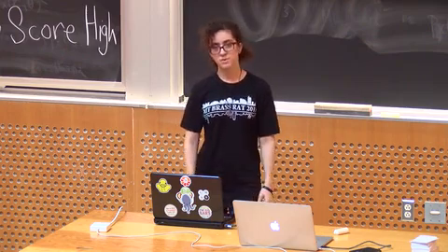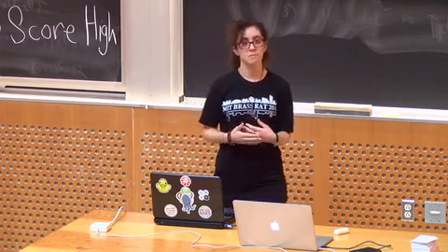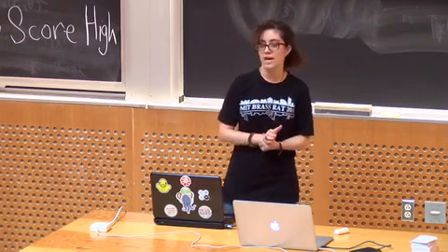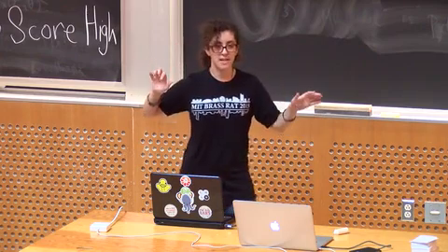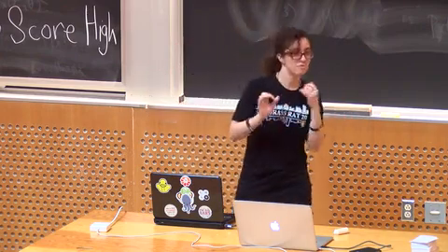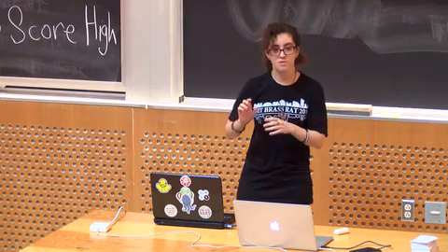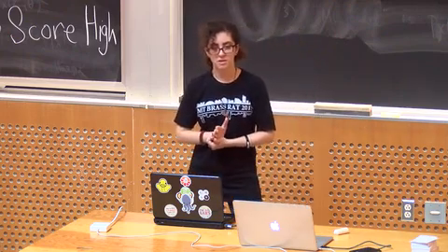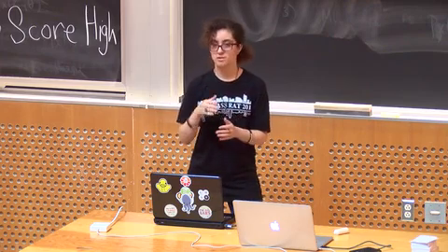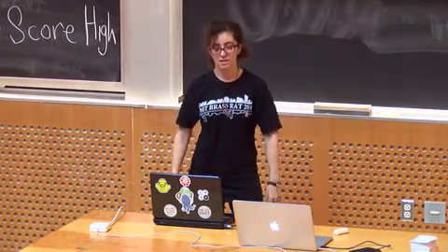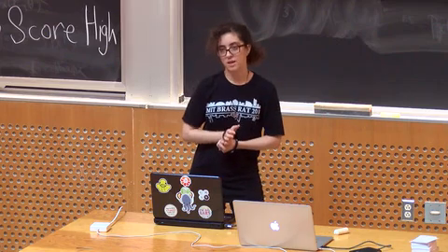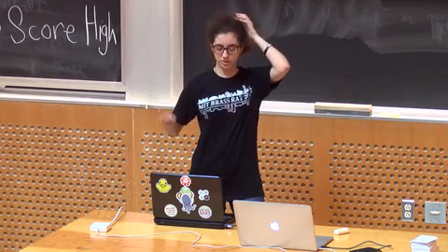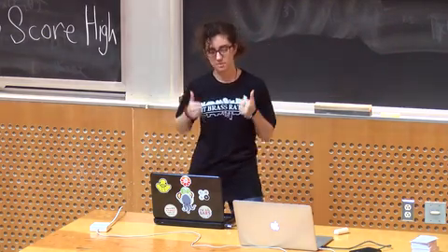Another thing we had to do earlier would be feature cutting, because if you don't cut features definitively earlier, you'll still have it lingering on some people's minds, like, oh, I have to do this so that in the future we're gonna maybe use this feature. But if you cut these features early, then you limit the propensity to have bugs. And while it's unfortunate that you have to cut features, it's necessary. So doing it earlier is the best time to do it.